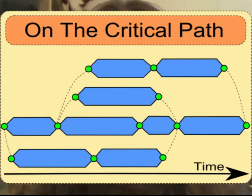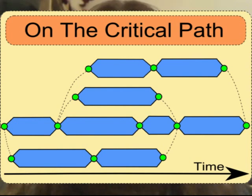A scheduling diagram is then constructed, placing the tasks in temporal order. Here is a diagram of one project to illustrate the idea. The horizontal axis represents the passage of time — the project starts on the left and its goal is on the right. The vertical axis merely serves to separate out tasks that are to be performed in parallel. The tasks are shown as coloured strips, and the length of the strips indicates the duration of the task.